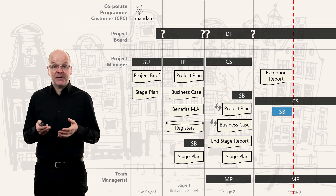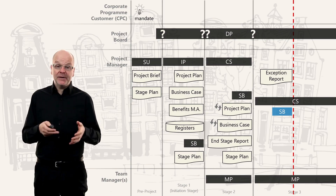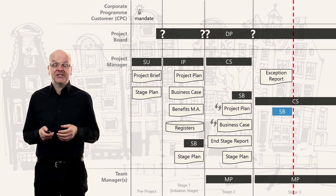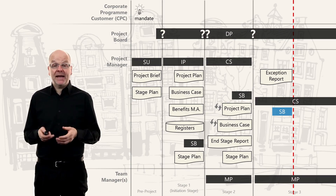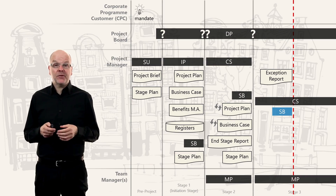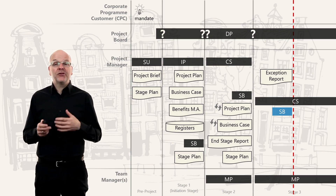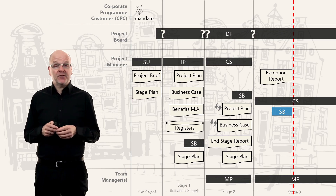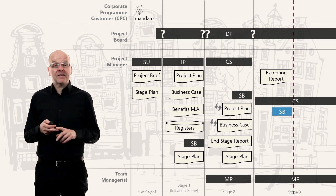If a new stage plan is needed, the project manager will start a stage boundary process to create it. The two documents updated in the stage boundary process are the business case and the project plan.